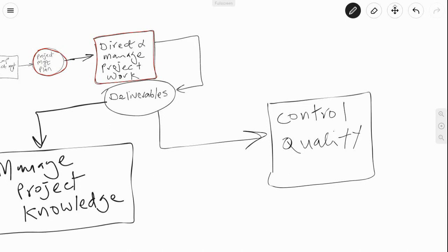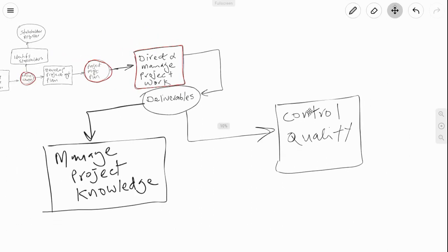If we don't send it to the customer, then that alludes to a change request that needs to be put back into production. And this deliverable needs to be reproduced. It needs to be redone. Okay, we need to redo the deliverable. And if it meets the needs on the next go round, then we send it to the customer. If it meets requirements and meets the needs for which we undertook the project, then we send it to the customer. So let's take a look at how that works. This is going to take a few minutes.